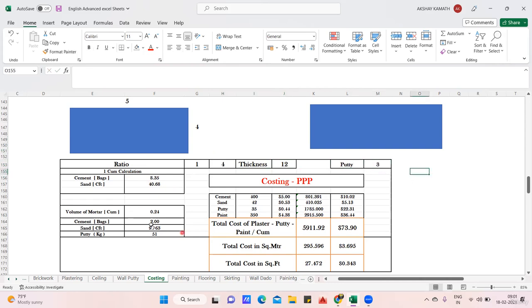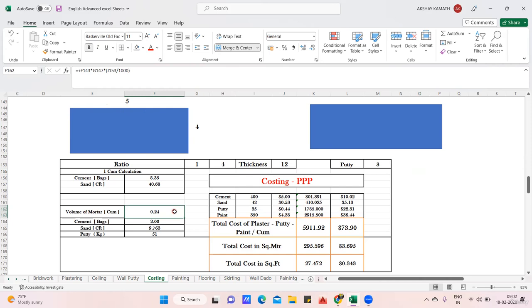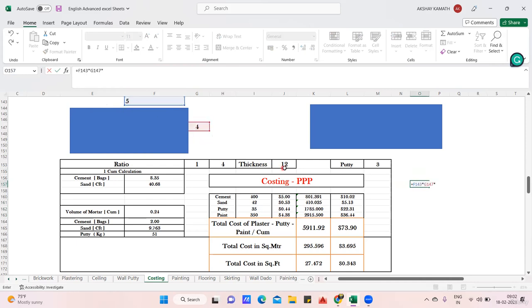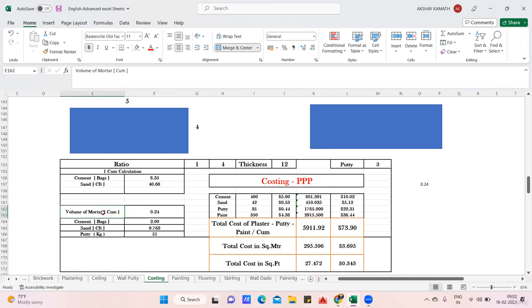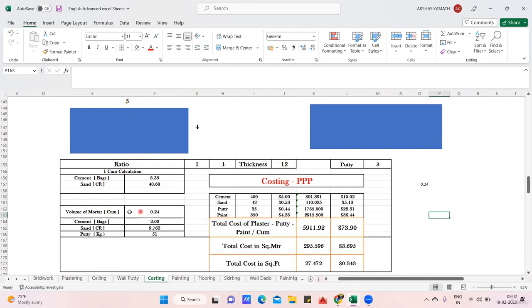Now I'll find the total volume. The wall is 5 meters long and 4 meters wide — or 5 meters high and 4 meters wide. I want the area: 5×4 = 20, but I also need the thickness of 12mm. So volume = 5 × 4 × 0.012 = 0.24 cubic meters. This is the mortar volume required.